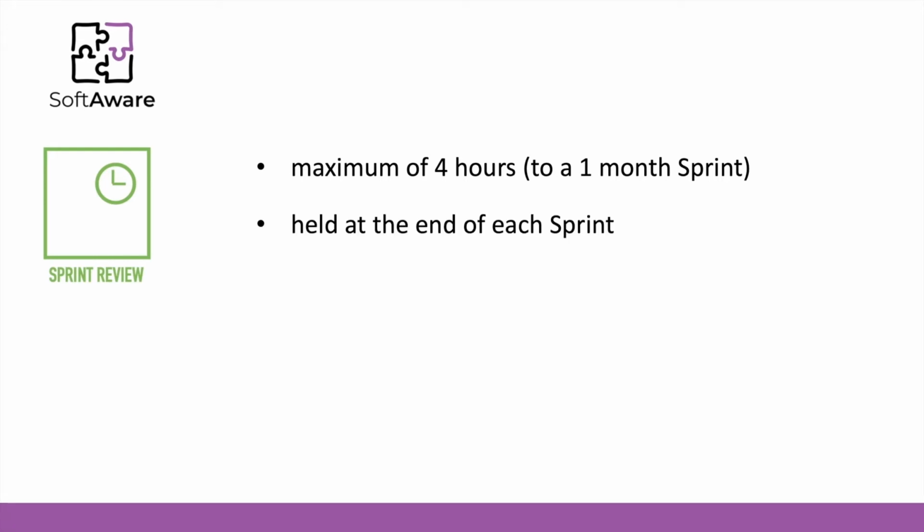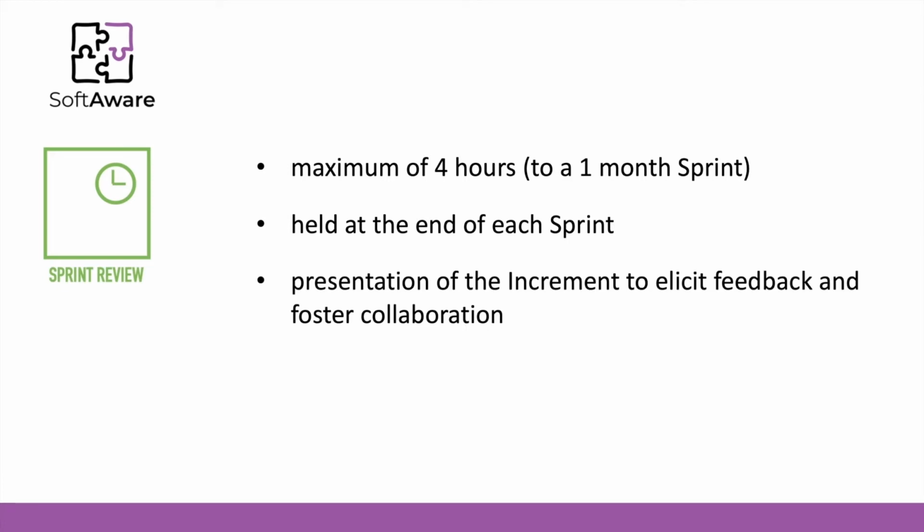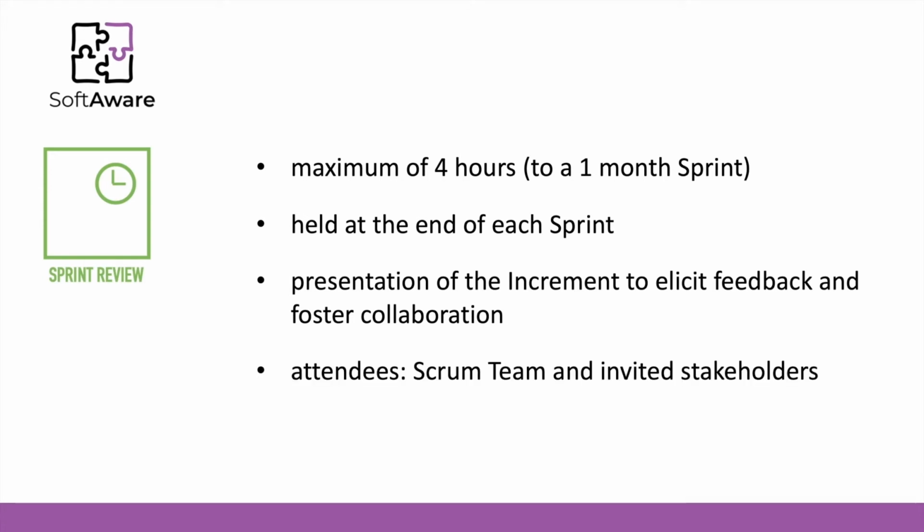It will be held at the end of each sprint, and you have to present the increment, so the software product increment, to allow everyone involved in the sprint review to provide feedback and collaborate on what was already achieved during that sprint. Who should attend a sprint review? The entire Scrum team and invited stakeholders. So for instance, you can actually invite your customers to this sprint review so that you can show them the